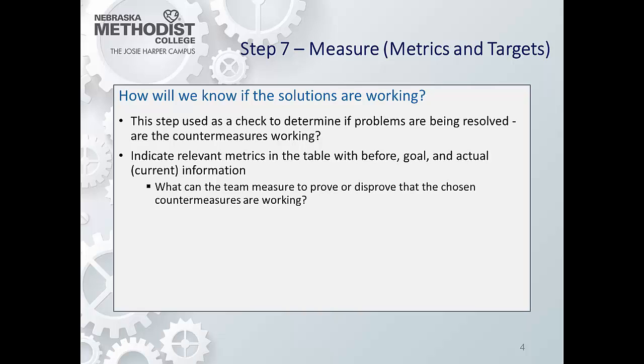In this manner, you can actually start to populate step 7 in the A3 form as soon as a goal is chosen for the project, but then use this area to continuously review the status throughout the project. A run chart is also a very effective tool to monitor and visualize the performance of the process as the changes are made.